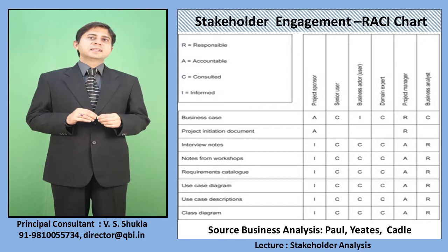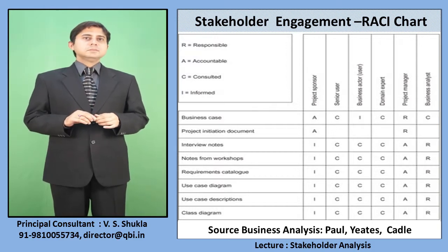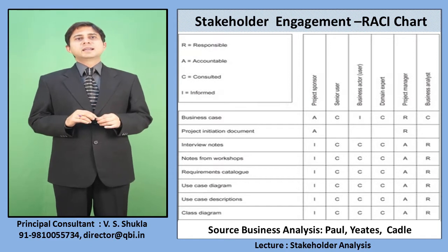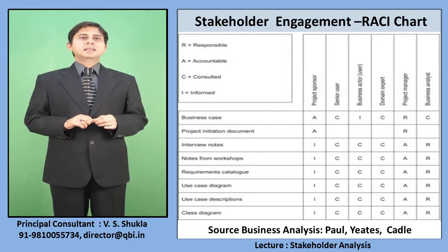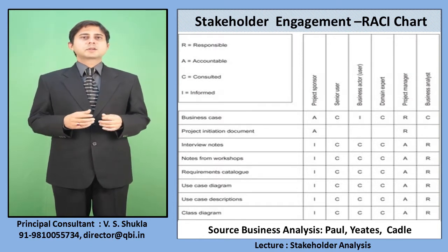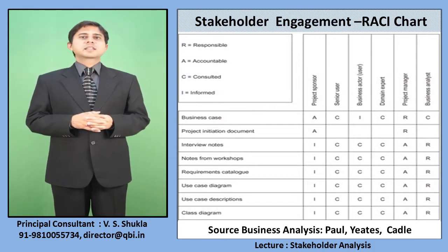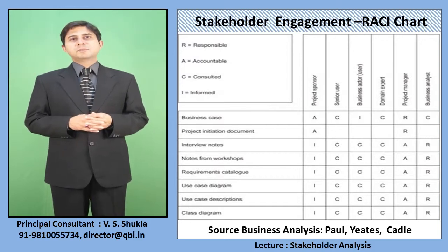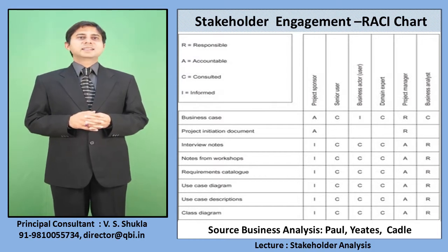And you see here, the business analyst is to be consulted for the business case. The project manager is responsible. Then for the project initiation document, again the project sponsor is accountable and the project manager is responsible. For interview notes, definitely for the interview process you will not involve the project sponsor all the time. So the project sponsor is to be informed, the business analyst is responsible, the project manager is accountable, and other users are to be consulted for the interview.